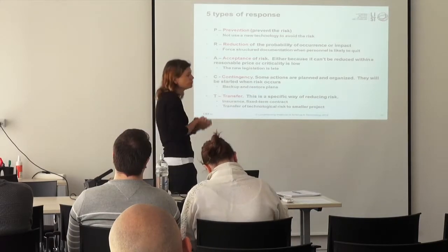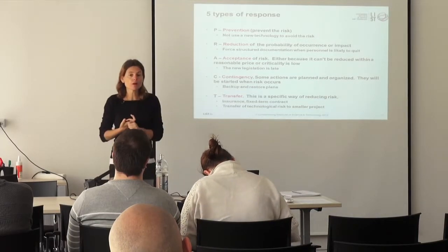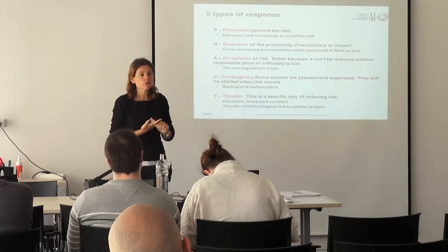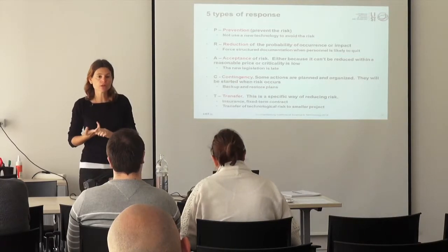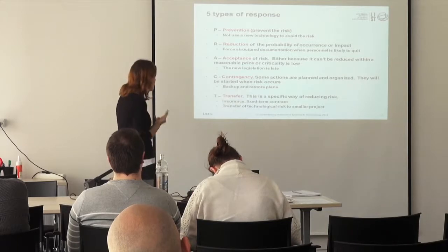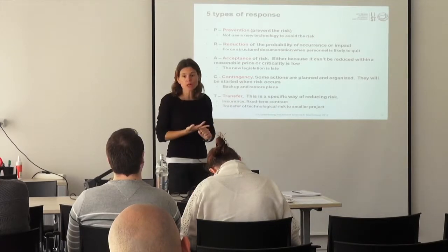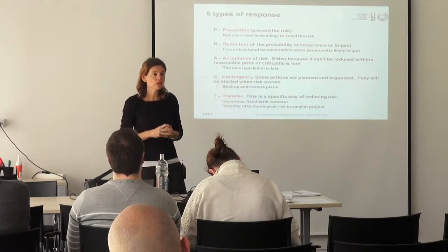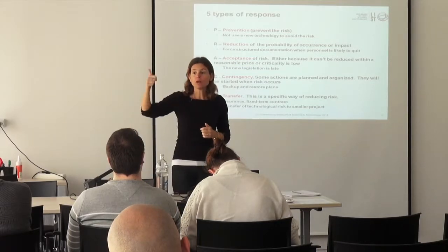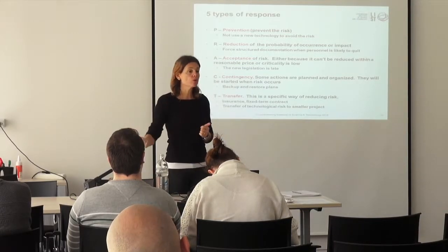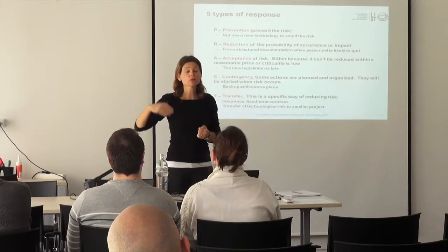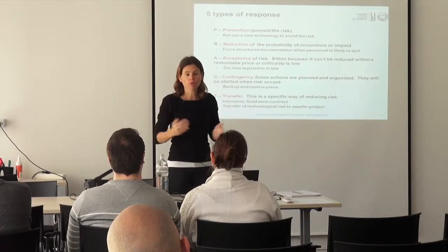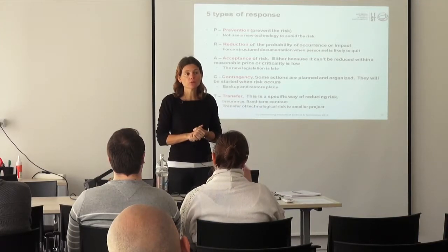So having some insurances on some parts, or having some specific clauses in contracts, having some fixed term contracts. So contracts where you say to your supplier, if you are late, if you are not delivering what we have agreed, it's your fault, you're going to pay us indemnities or whatever.